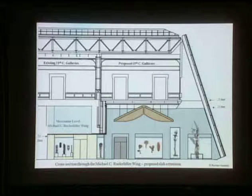Okay. In order to bring in a truss, a section of the glass curtain wall, that's this here, was dismantled, tracks were laid to the mezzanine fascia wall, that's what you see here, and the truss was brought in in 3 sections to be assembled in situ and raised on jacks that were monitored by lasers to make sure they were operating in tandem. AAOA's former collections manager, Halit Zwick, and I stood on the grassy hill outside the window one breezy fall day and watched the truss slowly rise up the wall. So it rose from the floor right up to this point you see here. The topping off ceremony occurred on November 12, 2004. The brilliant engineering was evident even to amateurs like us. But I'm getting ahead of myself because this phase of the project came much later.